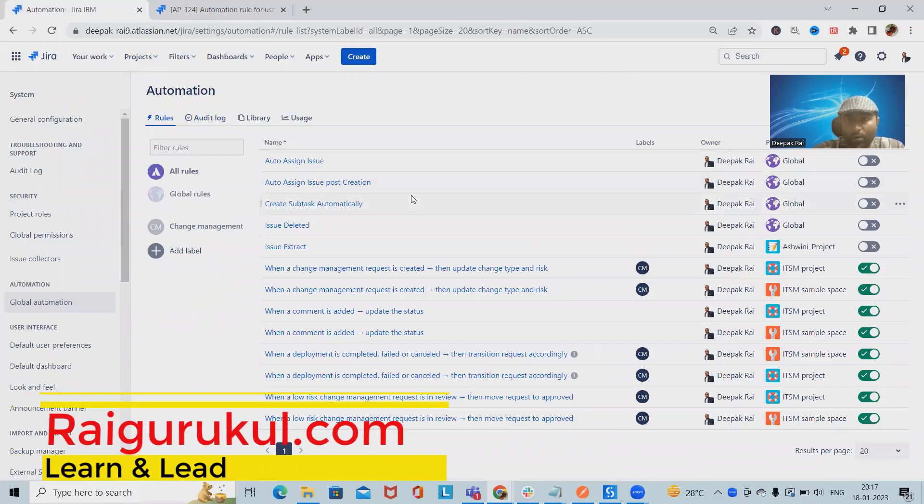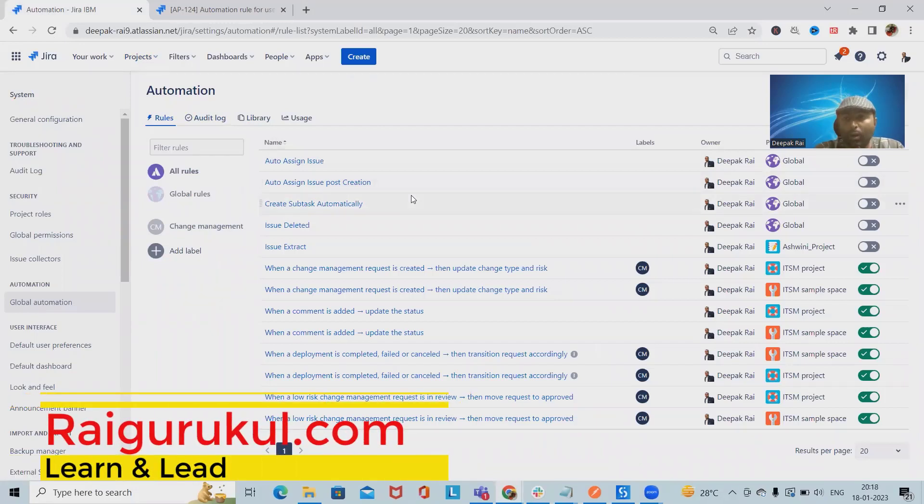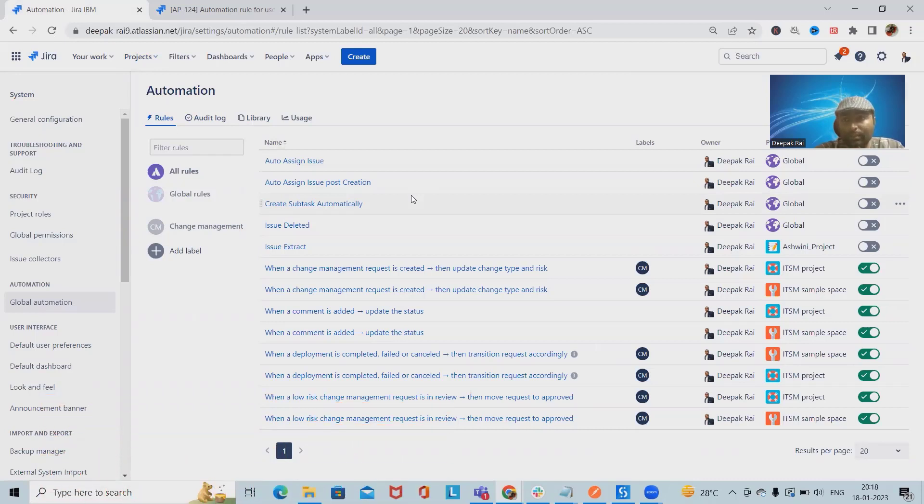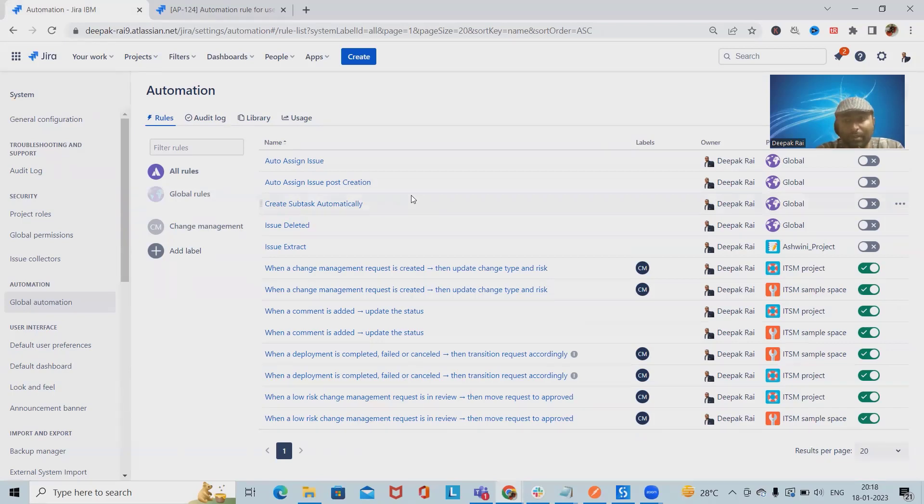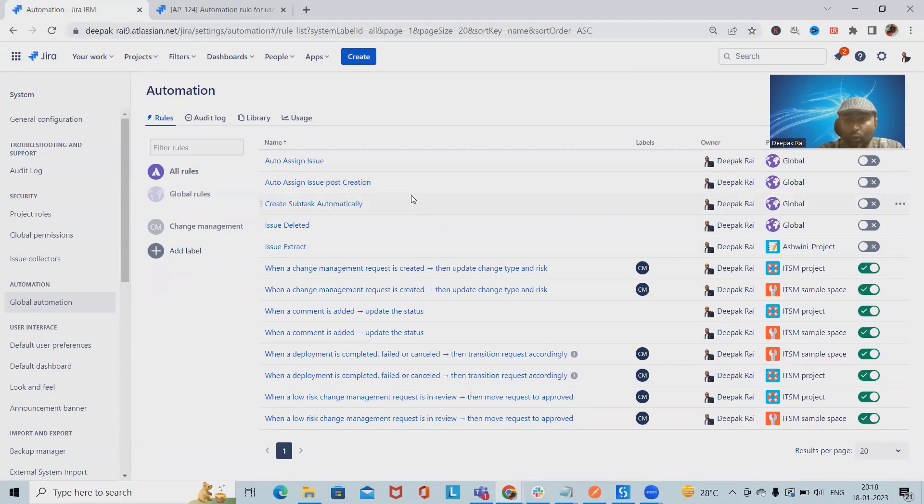Welcome to raikurkul.com. In this video we'll discuss how to create a transition rule using Jira automation. In Jira automation tool, let's say we have a subtask or a user story which contains five or six subtasks for development. If all the subtasks are done, automatically the parent user story should be updated as done status. We'll see how to do it automatically within Jira automation rule.